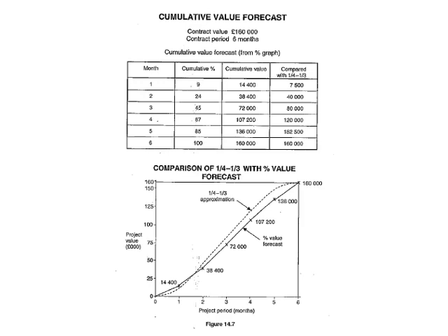On a 6-month project, you estimate that you will spend 9% within the first month, 24%, so it is 15% on top of the 9, so this is cumulative. And then you go to 45%, then 67, and then 85 up to 100. So very easy. Then you just plot your